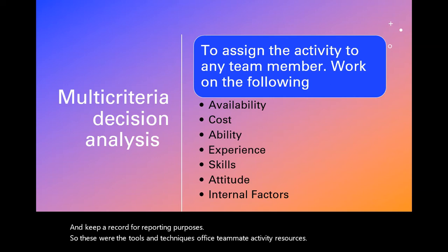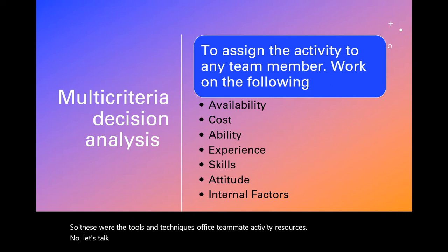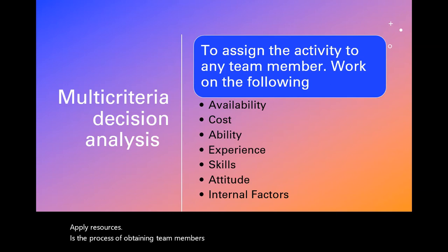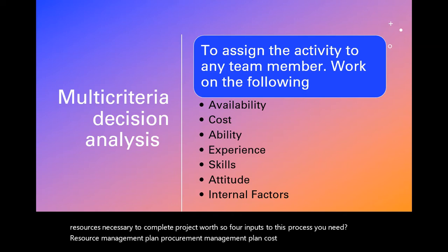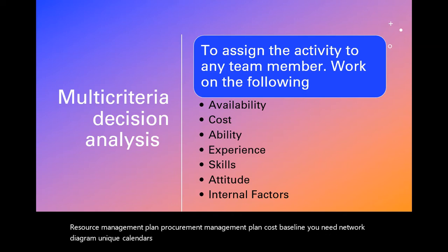Now let's talk about acquire project team. Acquire resources is the process of obtaining team members, facilities, equipment, material, supplies, and other resources necessary to complete project work. So for inputs to this process, you need resource management plan, procurement management plan, cost baseline, network diagram, calendars, resource requirements, and stakeholder register. It means you need everything.